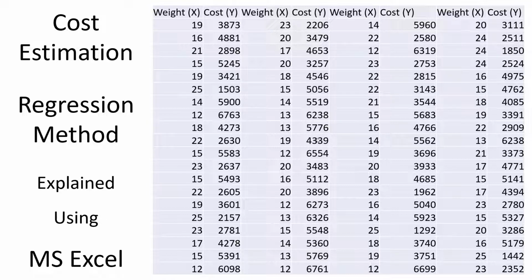So regression method is simply it uses some independent variables, some x variables, to predict y, the dependent variable. In this case, we'll be showing the simple linear regression. So simple is just only one variable, and linear means there is no square term. It's just y equals mx plus b type of situation. So the prediction of the cost y will be based on just one single variable x and no quadratic or upper level term. It's just the linear term.